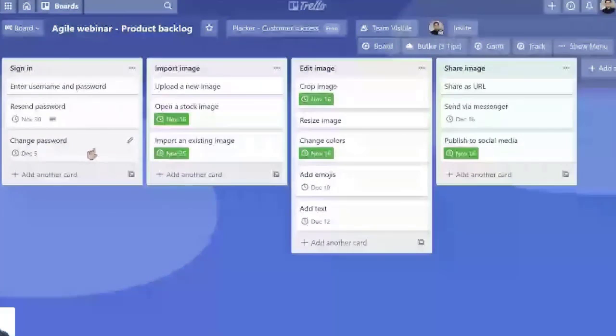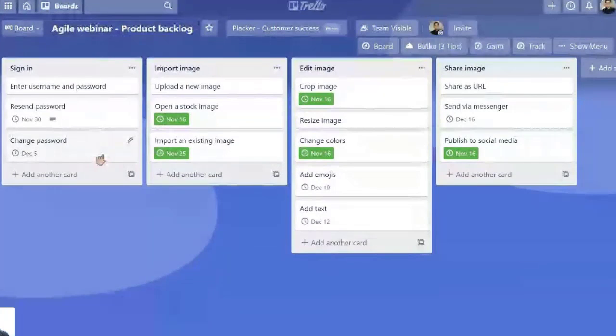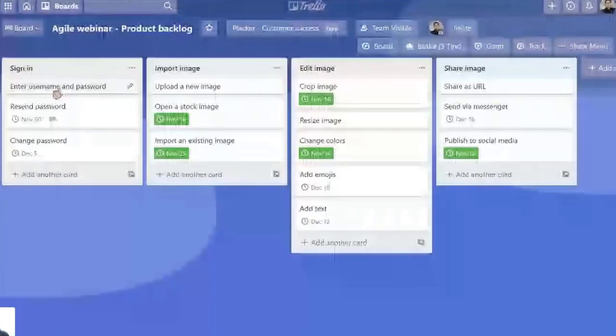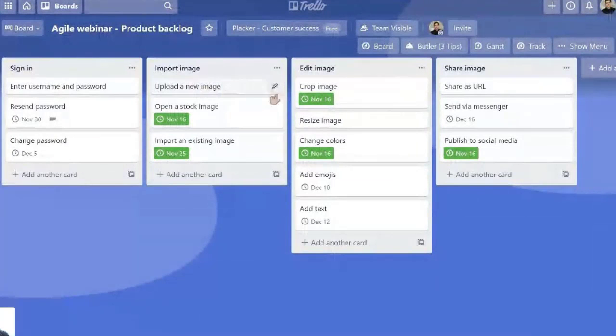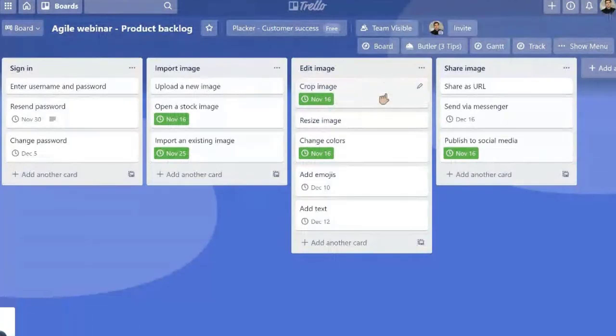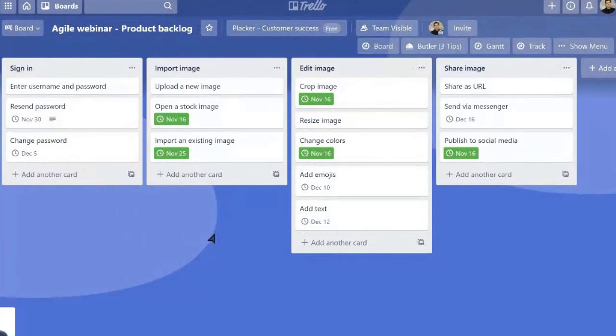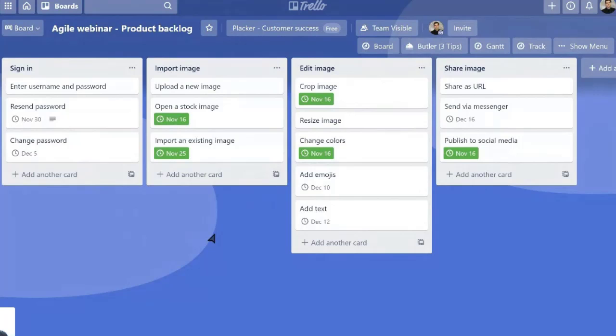So we would take, for example, enter username and password, upload new image, and crop image. We could select these three, for example, to work on Sprint 1. In Trello and Placker, the idea is that you can create a separate board to focus on what you need to do in the next sprint.